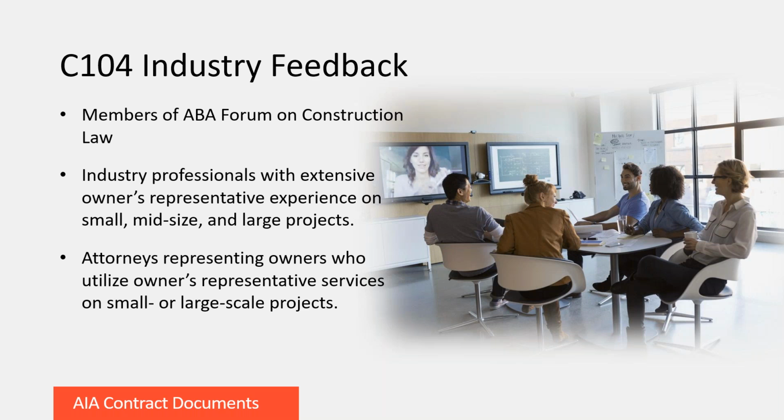So, for example, an owner's representative may have full authority where they can act on behalf of the owner on any activity throughout the duration of the project, or there may be limited authority, such as the owner's representative acting under certain monetary thresholds, meaning they can only make decisions that will impact the project within a certain dollar value, or they may be restricted from acting on behalf of the owner for certain critical aspects of the project.